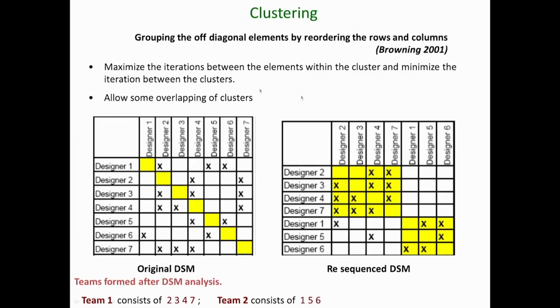Ultimately what we will do with a DSM is to find design groups that should work together. So, here there is an operation we are calling clustering, where we have identified the design clusters that should take place. Basically we are saying between the cluster here and the cluster here, within this cluster there is a lot of interdependency and information exchange.